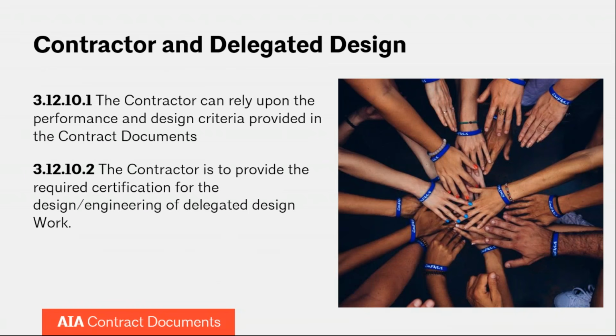The A201 also includes language about delegated design. This is an emerging topic in our profession, and it's something that is really going to be changing over the next decade or so. In many projects, the owner and architect choose to delegate the design of specific portions of the work to the contractor. The contractor then hires its own design professionals to perform the design based on criteria provided by the architect.